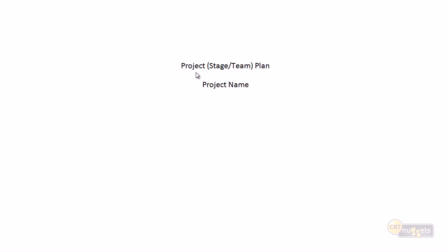Our next deliverable is the PRINCE2 project plan. PRINCE2 typically calls it just the plan because we recognize that this document could be a project plan, in which case it's outlining the approach for the overall project, or it could be a stage plan, which is the subset of the project plan defining the processes to be followed for just the next stage.